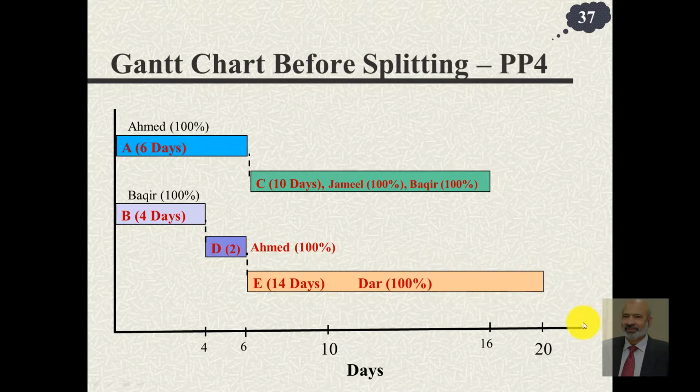The project would get completed in 22 days. So you would bring down the cost, but you will end up increasing the project duration. If you shift this A, you will have to shift it here. So 6 plus 16 days shifted after 6. So you start from here, 6 days plus 6 of A plus 10 of this, again you go for 22 days.